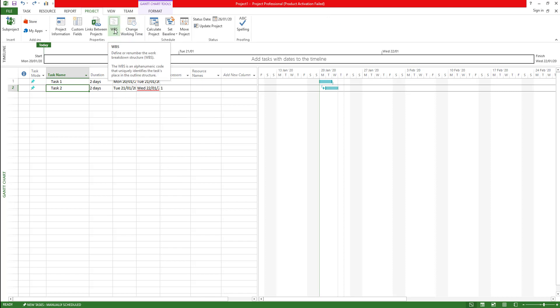The WBS defines or renumbers the project breakdown structure. This actually gives you the code for the project breakdown structure. This can be an alphanumeric number, so it can have text as well as number, but it should have one incremental number field so that it can increment automatically.